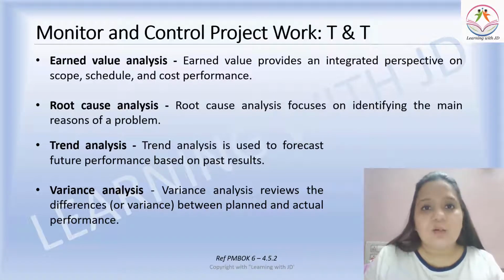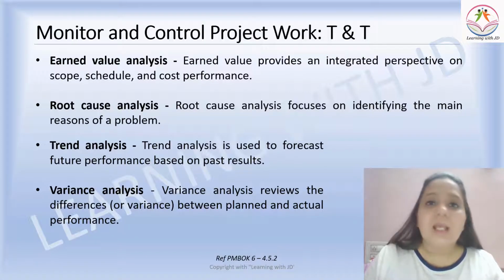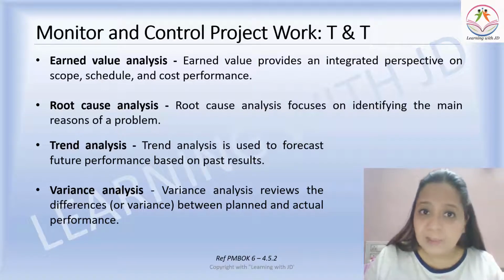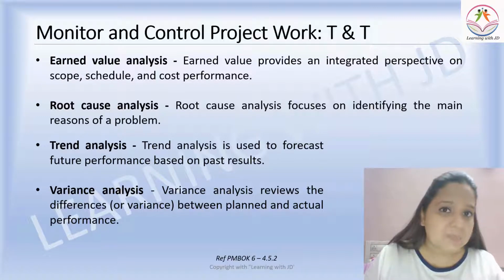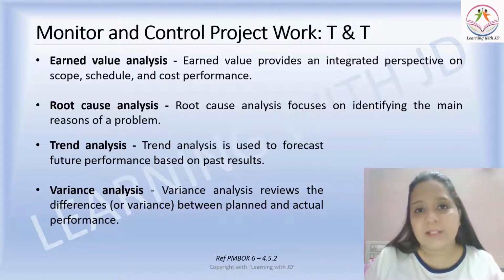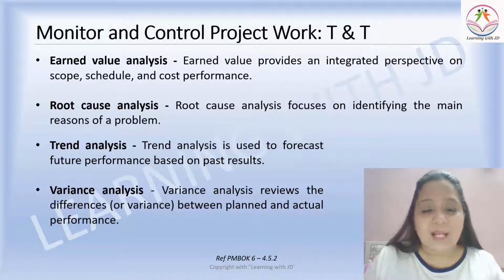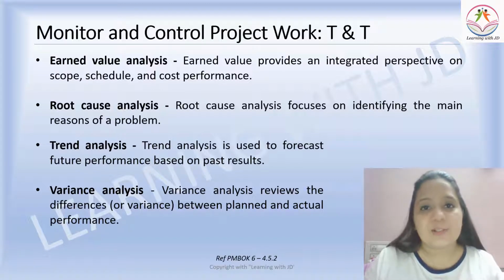Variance analysis. Variance analysis reviews the differences between what was planned and what is actual, and what is going to be the future realistic output for it. It can be a possibility that something has been planned, that some work will be completed in a week's time, but for the last 6 months that work does not get completed in 1 week. It takes around 10 days. So that is what is known as variance analysis, to identify the difference between the planned and actual performance.